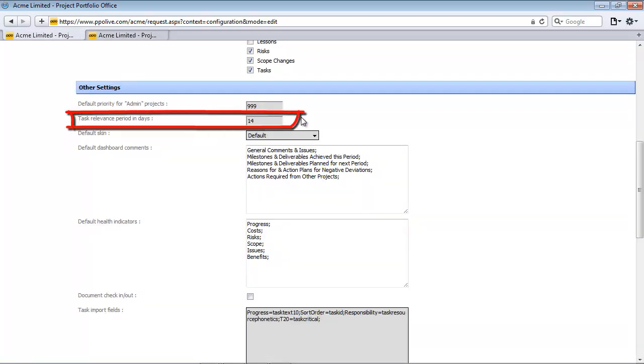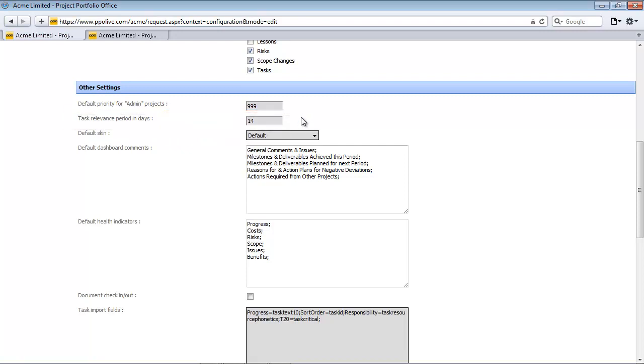the next setting is the task relevance period. PPO allows the client to set up a standard reporting period that will mainly affect the project manager dashboard and the upcoming task report. These settings ensure that these reports only show items that fall within the specified range. If you report monthly, change it to 30 days. If you report every week, change it to 7 days. If you want to find out more about how this task relevance period is calculated, feel free to access our FAQs.